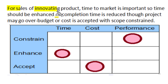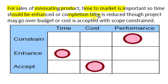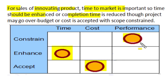For sales of a new innovative technology product in a competitive market, time to market is very important. So during development, the time criteria should be enhanced — meaning completion time should be reduced. In that condition, the project may go over budget, so cost is accepted, while the performance parameter or scope of the project remains constrained and unchanged from the planning phase. Time is enhanced with cost accepted.